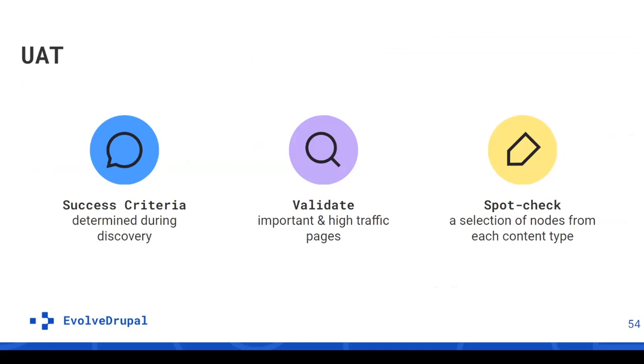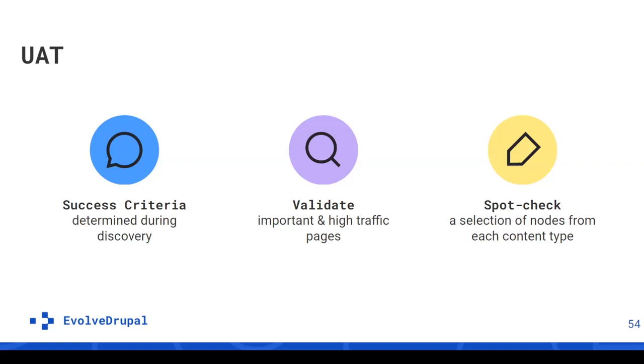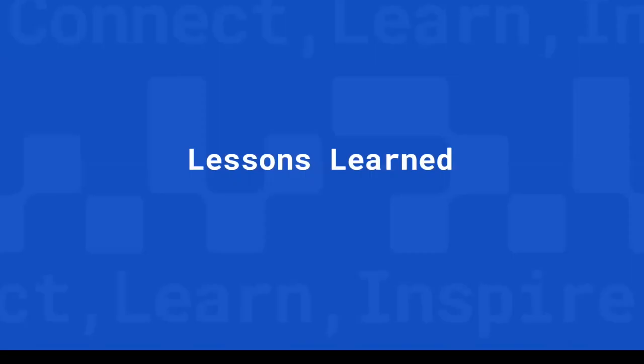Then we're going to get into UAT. What kind of things are we looking for? Some quick tips about success criteria - it's really important to think about that in initial discovery and planning phases, making sure we know what we're looking for. Then there's validation of important and high traffic pages. Those really important landing pages that maybe are part of an event definitely need to be validated. And spot checking the actual content itself. For those 30,000 pages, you have to work together and collaborate with the team to figure out what pages need to be checked, what unique ones use certain features, to get a good sample size of all different content types.